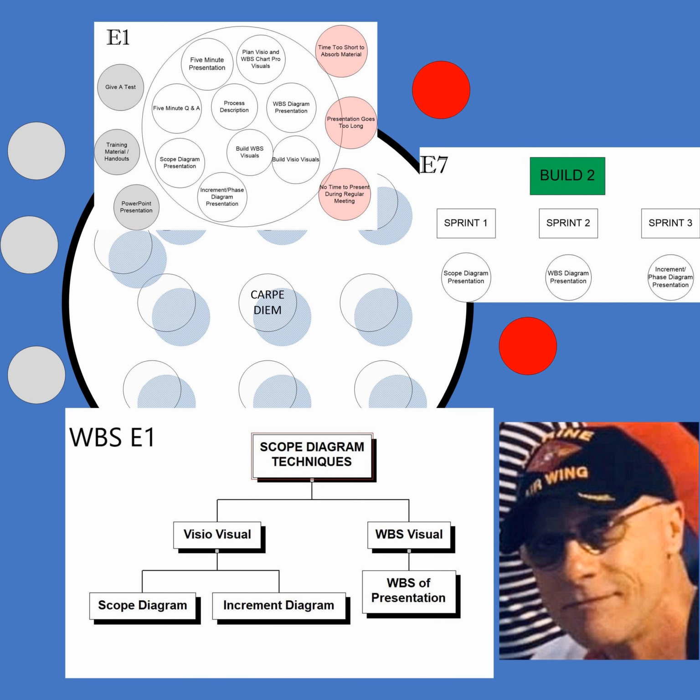Now you're going to see how this made it easier, because I took this sort of idea and presented it this way rather than in a Microsoft Project schedule. And then, as you can see to the right, disposal: identify decommed racks, identify soon-to-be decommissioned racks, decommission equipment, disposal procedures, dispose of excess equipment, all another part of the project. But to the left, I've got what's going to one center and what's going to the other center. And soon, I'll show you how I use that.